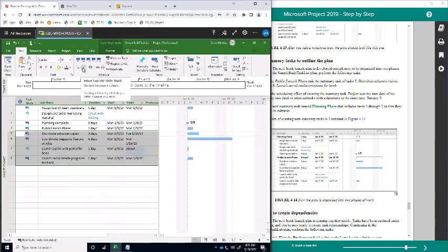A few things will change on the left side of my project file. Okay, notice what change will take place also for task number 4. Okay, I'll just do that. Okay, so first the indentation occurred, and now task number 4 is a summary task. And this summary task will have under it a number of subtasks. So it has to distribute all the way to launch the program, and then you do have that's exactly the change that happened.